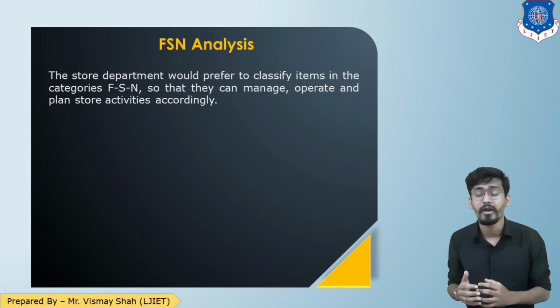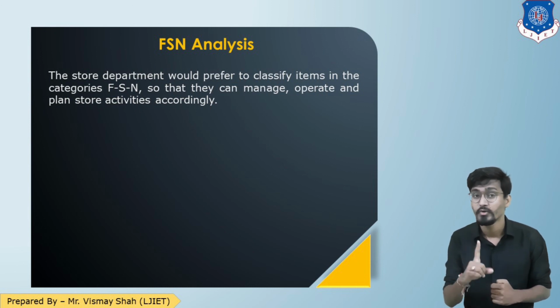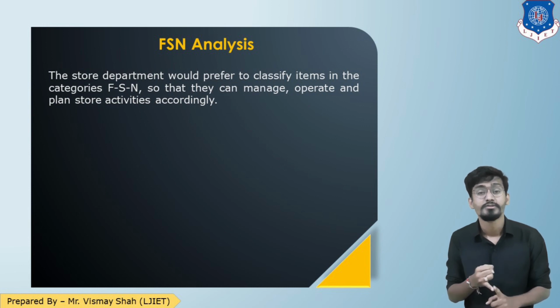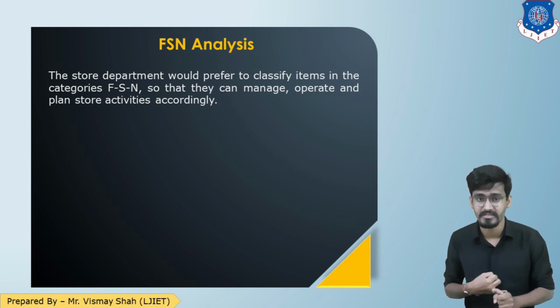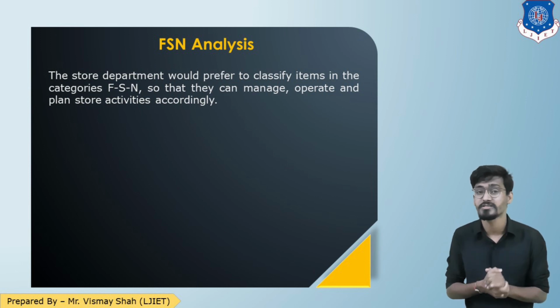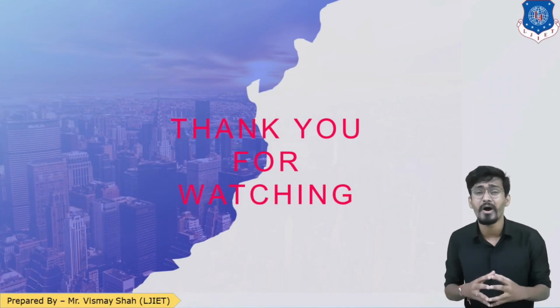Because when you order a material, you are not only paying the material charge, you are paying ordering charge, storing or handling charge, transportation or loading unloading charge, and stock out charge. Apart from the material cost, there are 4 kinds of cost. So in the next session, we are going to understand this scenario, and there is the concept of economic order quantity. Alright. So this is it.